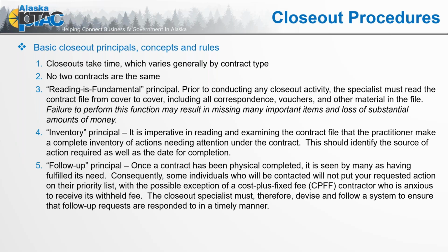And the follow-up principle, which ties to your inventory: once a contract has been physically completed, it is seen by many as having fulfilled its need. Consequently, some individuals who will be contacted will not put your requested action on their priority list, with the possible exception of the cost plus fixed fee, because there's still more money tied to that. And that contractor is anxious to receive its withheld fee. The closeout specialist therefore must devise a follow-up system to ensure that follow-up requests are responded to in a timely manner.